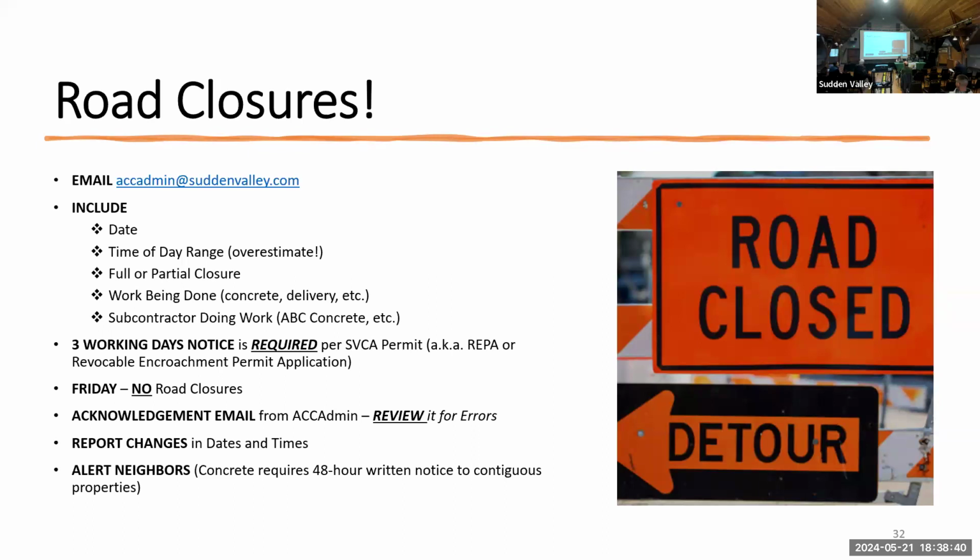So I'm looking for the date and the time of day that you're going to close the road. And I always tell people, overestimate. If you're having a delivery and you think it's only going to be 45 minutes, tell me an hour and a half, whatever. Better to overstate than to understate. You need to let me know if it's a full or partial closure, what type of work is being done, and if possible, who the subcontractor is.